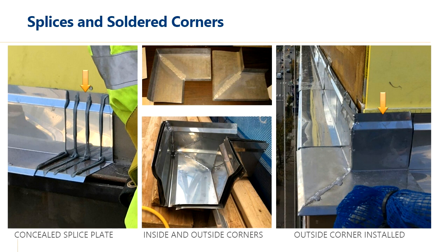Okay. Inside and outside corners, we got a lot of these pre-soldered, and that really does help. They're able to put that corner in place and pretty much move on just like the other laps, rather than having to fiddle and trim and cut the corners together.